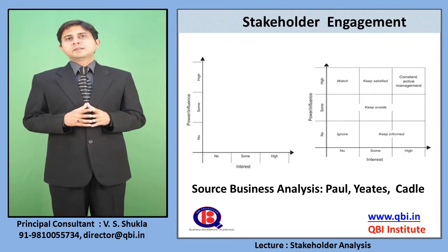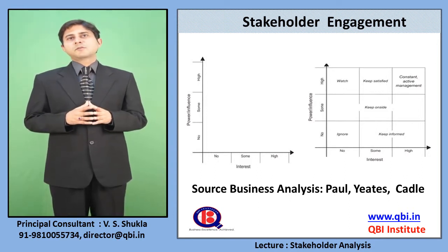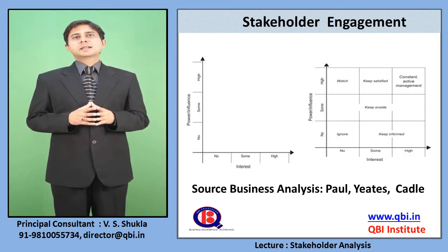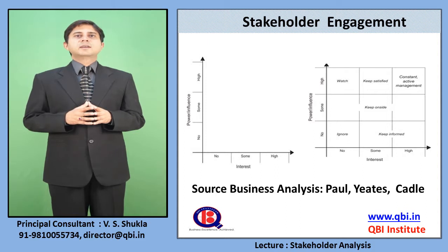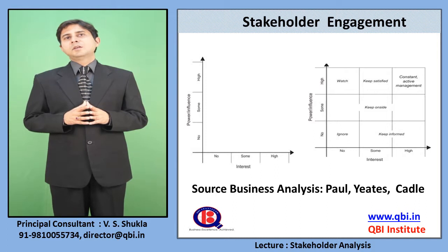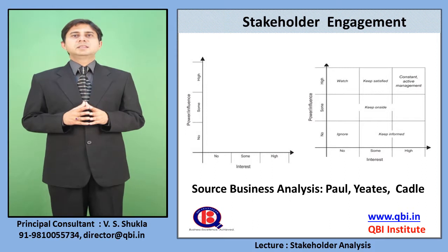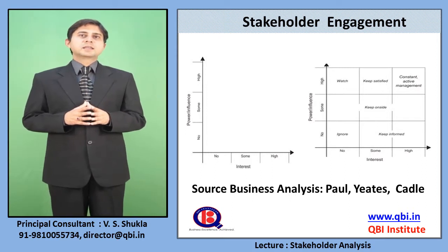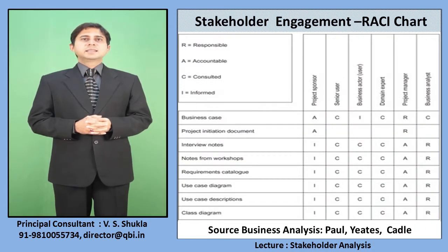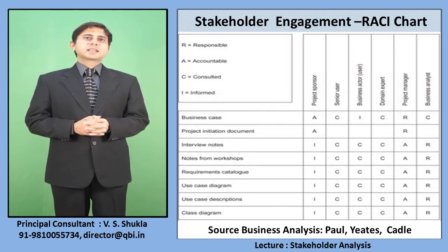If we make the grid lines, we come up with 9 rectangles, and for whichever rectangle the stakeholder falls in, they have provided appropriate stakeholder engagement tactics. You can have a look at it and apply the same example of a CRM solution being implemented in the company, and come up with your list of stakeholders and whom to engage in which manner.